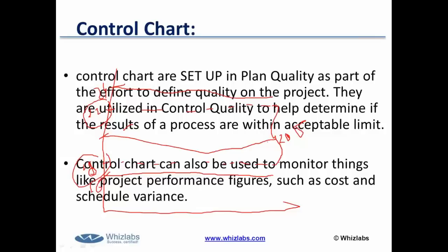Okay. Now let's go back. The first product which you are checking is above the control limit. The second you are checking is again above the control limit. The third product is again above the control limit. Fourth, fifth, sixth, and seventh. If you are checking non-random product, or the random product, and all 7 random products which you are picking up are above the control limit, this is also called the rule of 7.